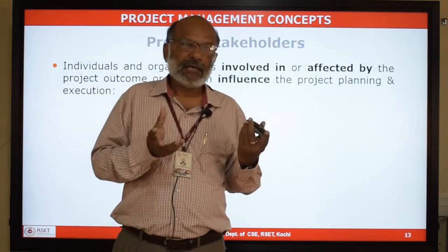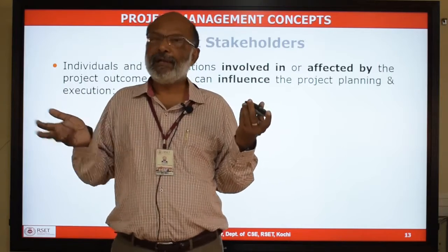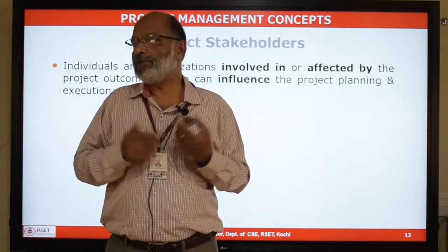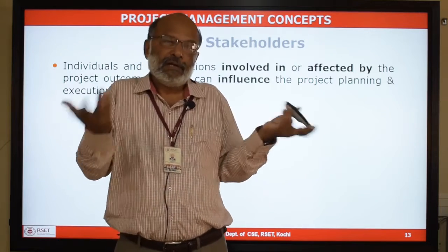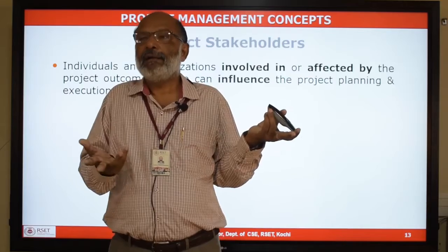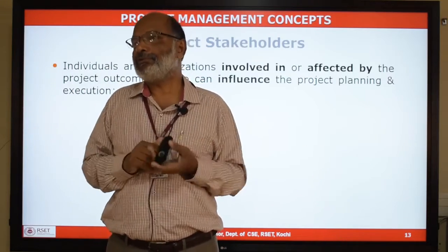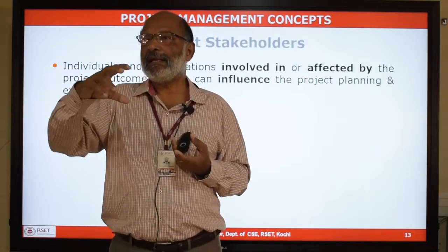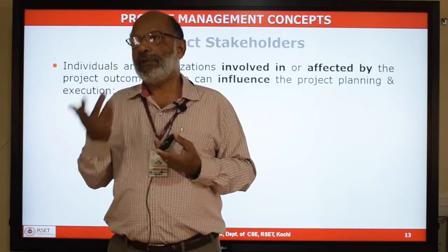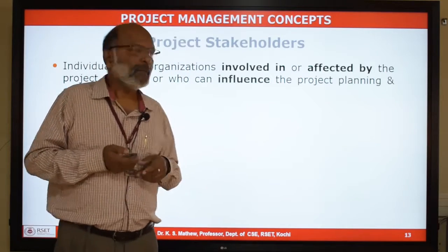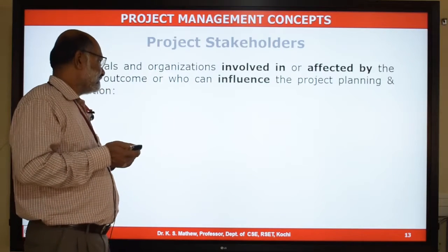And take many construction projects, for example, right? If you want to construct a building, you need to get the approval from the municipality or the corporation. So, they are not involved in the project, they are not affected by the outcome of the project, but unless you get the approval from those authorities, you will not be able to start your project. So, they can influence your project and stop your project, right. So, they are also stakeholders of your project. So, these are the categories of stakeholders that can be there in a project.